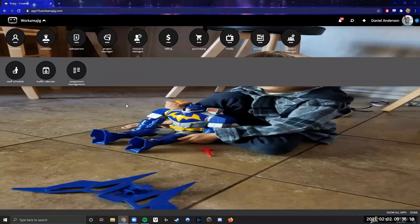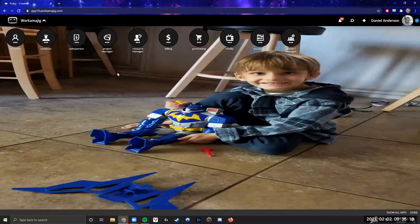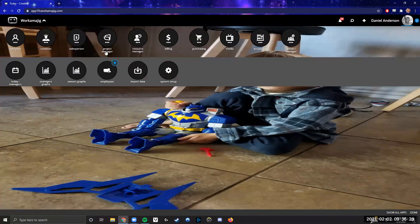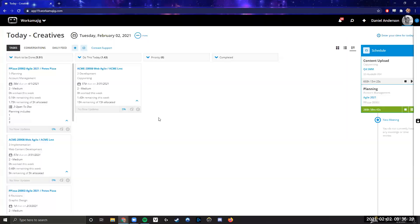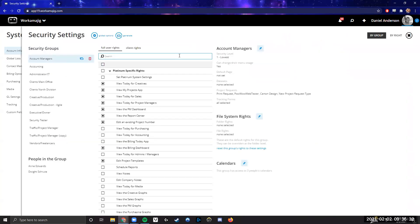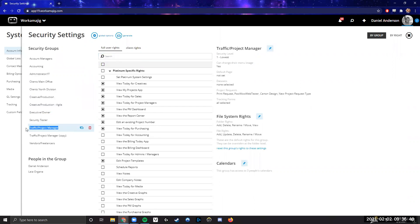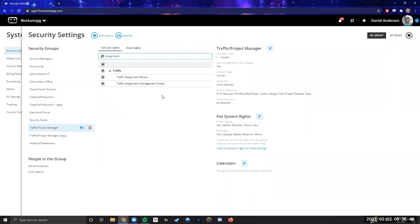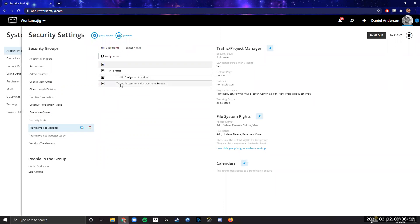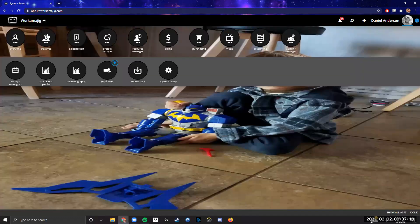Let's start with some housekeeping. The assignment management tool is off by default, and the Creatives Today page also has a tile view that's off by default. If we go into system setup and look at the security rights, that's typically what's preventing this page from showing up. Select the security group you want — for example, your project managers — then type in 'assignment.' The specific right you're looking for is 'traffic assignment management screen.' This is the one that actually unlocks that screen for whatever security group. If you're not seeing it, that is almost certainly the reason why.